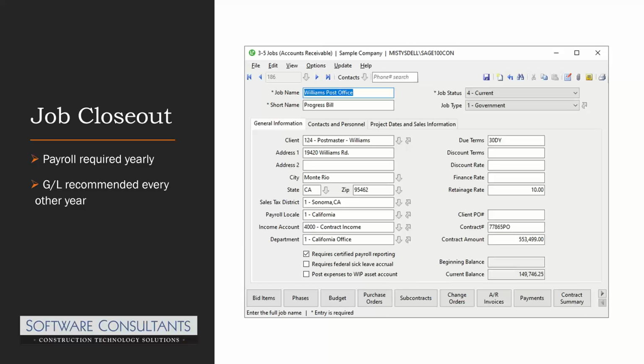So I would have my project managers log into Sage and use that actual column as a percent billed. So that's how they would communicate to me. I would go into the same cost to complete and look down in the schedule of values, using the cost codes. He said 10% on this item, 12% on this item, nothing on this item. And that's how I would match up to my progress billing.